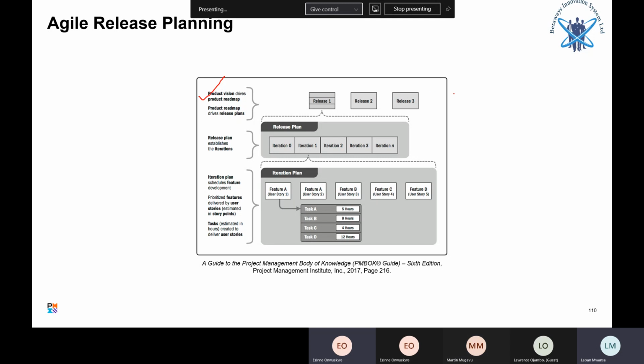We need release plans because sometimes you can finish a product incrementally. For example, we finish these products, but the market is not ready. So what do we do? We package them into a release and wait for the market to be ready. For example, some promotions work well during Easter, and some products sell during the holiday festive season, especially the fintechs, payment solutions, and promotions.